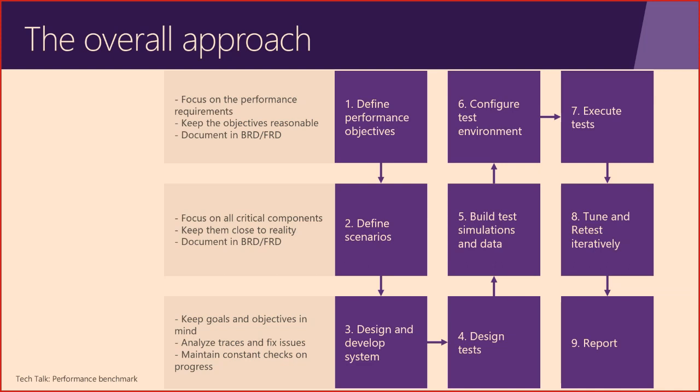If you have the right scenarios, you can then work on the right preparation aspects, meaning creating the test scripts. If you need specific data in the system first, it means a data expansion script. If you have a set of scenarios that are going to require horsepower, it would mean a specific environment, possibly a tier 4, a tier 5.